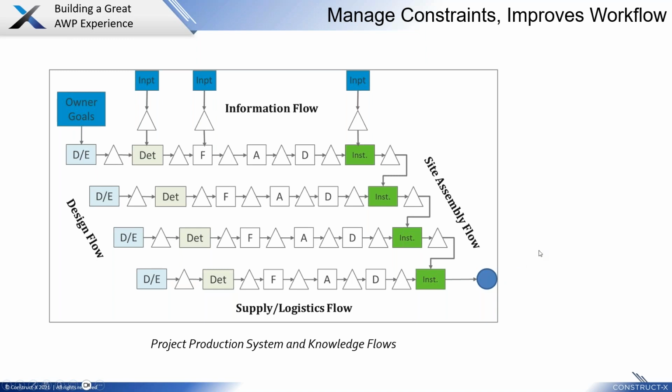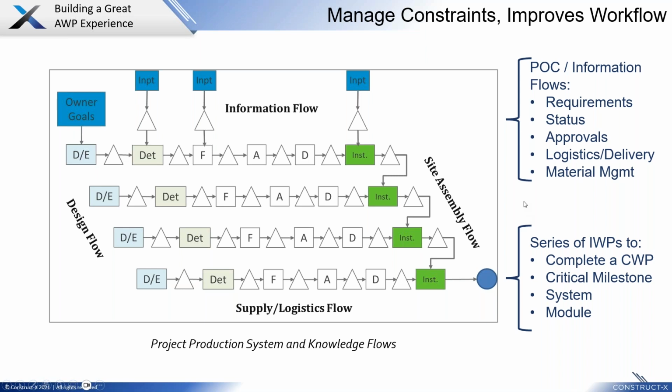Yeah, one of the little insights I got quite a long time ago that's really shaping my thinking is we used to talk about man loading the schedule, and what you really need to do is schedule the man load. All of your trade contractors and all of your crews need to have an efficient flow through the job site. The process Fernando's showing there is all about enabling that, so that they can get the job done for you and still make some money and still enjoy being on your project.